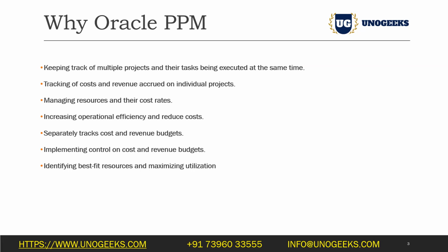There were some challenges related to the infrastructure and the labor, then COVID came. There was a shortage of raw materials. There was a shortage of labor resources. So the budget has shot up and the project is delayed. There was no availability of raw material, and no availability of labor. So we hired the raw materials and the labor at elevated prices, which is why the budget has increased. The project has exceeded the budget given.